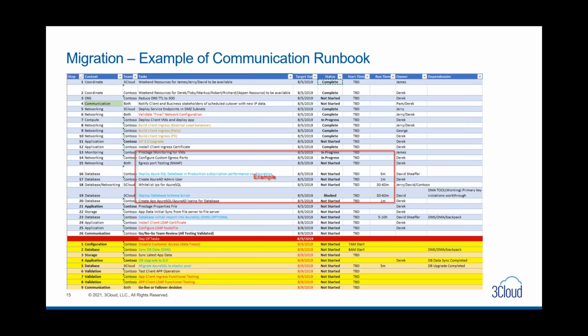When everybody's looking at the same game plan, you'll see up above in this visual all of the things that are pre-migration versus when you get to that red line, the day-of tasks, what time we're starting, who's doing what, and what to expect. We create these game plans with our customers to make sure that everybody knows who's where, so everybody can contribute and knows when they're expected. This is critical in making sure that a migration goes well.